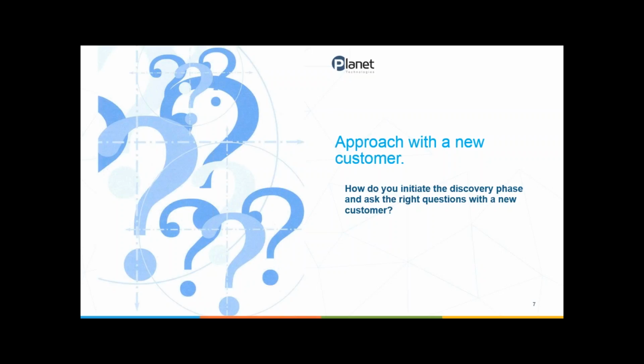Once that has been established and we've tested everything end-to-end from their deployment platform perspective, we'll actually go in and start creating the base test image with the customer. So we'll install the Windows 10 or import the Windows 10 WIM, create the task sequences, all of the technical aspects of getting it deployed, and then we'll do a full proof of concept. Proof of concept is really more around just validating the deployment methodologies are functioning as expected, and then at that point we'll be debugging anything.